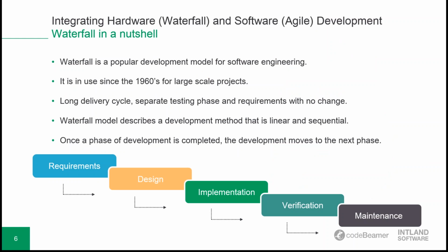The Waterfall methodology is widely accepted as being the first comprehensive design methodology. It is coming from manufacturing and constructing, and it is in use since the 60s for large-scale projects. We could see that the pure Waterfall model works well in situations where there are long delivery cycles, separate testing phases, and where the original design and requirements are unlikely to change.